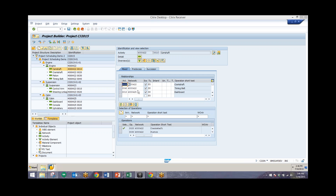We also have two other different types of relationships. We have a start-start with the fourth activity in this 422 network, meaning we want the camshaft activity to start at the same time as this timing belt activity. And then finally, the last relationship is saying we want to start this camshaft activity at the same time as the first activity from this 425 network — so the camshaft starts at the same time as this dashboard activity.